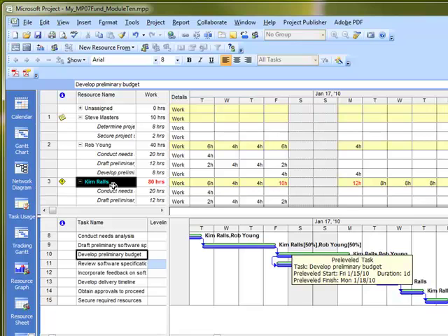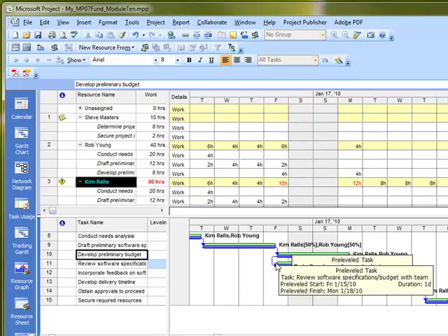So basically what it's saying is that if we were using Kim as an unnamed resource, for example, and we said, well, we're just going to increase, we're going to hire somebody else in the capacity of that particular role, we could do that. We could reschedule, we could add overtime, we could adjust the dependencies. Maybe this relationship between these two tasks isn't quite appropriate, so we might be able to change that.